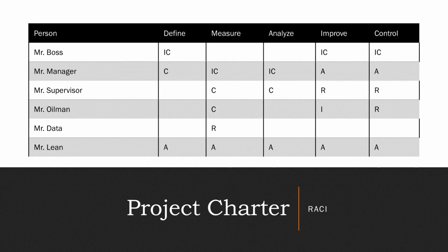And finally, you add responsibility matrix, where you list your team members and stakeholders and assign who's responsible, accountable, and who needs to be consulted and informed at every stage of a project.